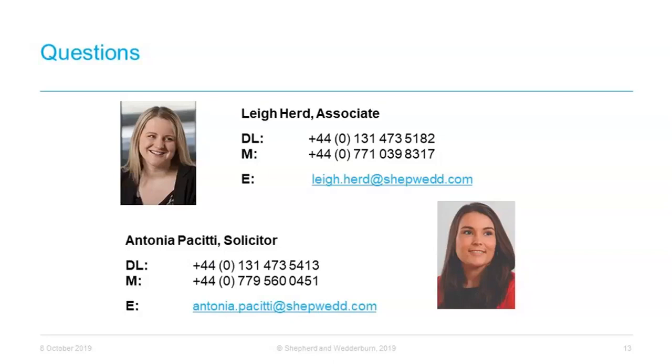So one of the questions that we've been given today is, can you discuss the requirement for PLS notices when applying LDs? In answer to that, you need to make sure when applying liquidated damages that you have all the information that your contract needs for those liquidated damages. We would recommend setting the calculation out clearly so that you have all the information there. Basically enough that you satisfy that test, which is the basis on which that sum has been calculated. It is common that liquidated damages are included in a PLS notice, but they might also require additional notices, so you'll just need to check your own contract.